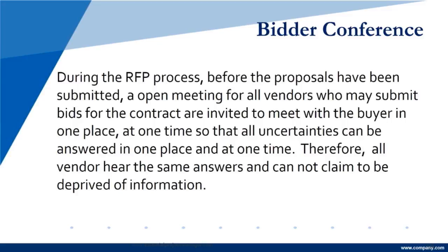What you want to do is to make sure that all the vendors that are potentially out there are hearing exactly the same thing, so they don't bounce back at you and say, we were not given a fair shake. This is especially true with large companies with deep pockets and governmental entities. They will have bidder conferences so that anyone who's interested in the work that they are offering out has a chance to hear exactly the same thing. So there's no confusion, and no one will come back and be litigious back at them.